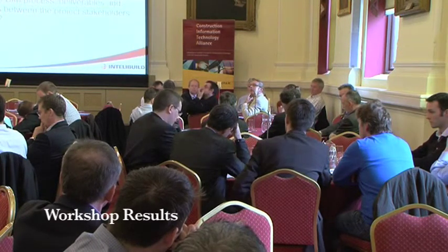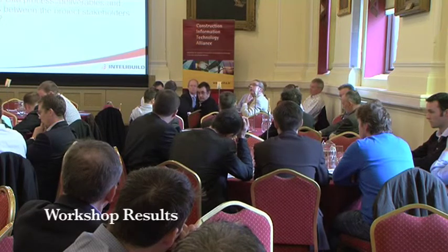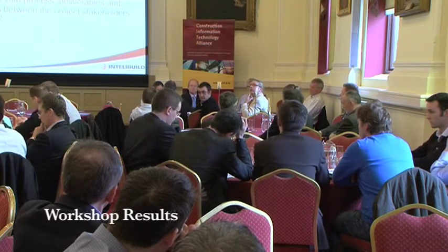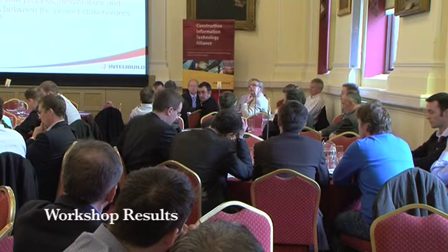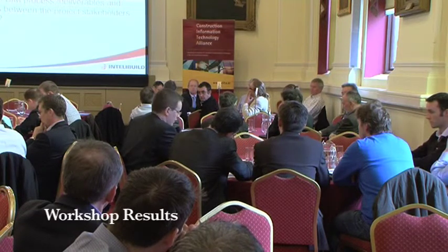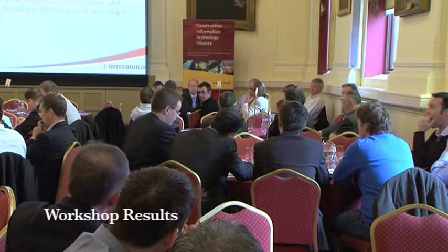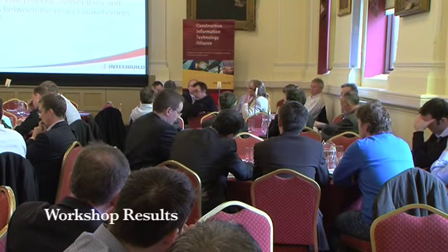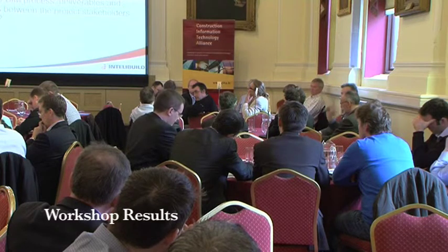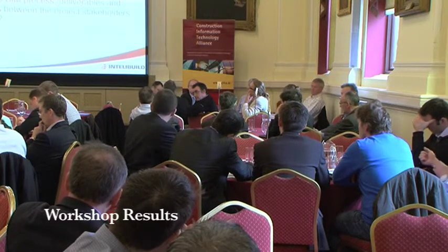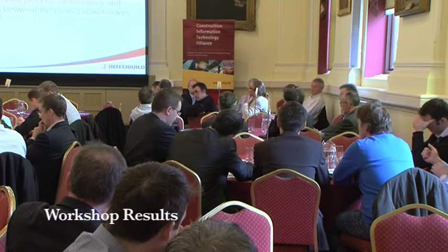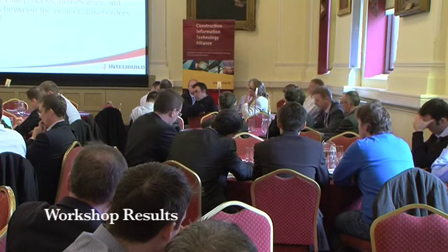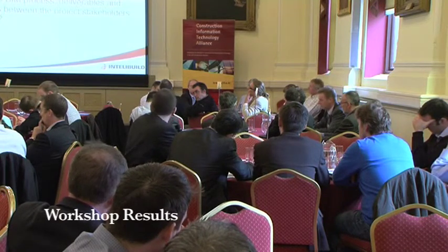Otherwise, they could get a BIM project manager in to create the BIM execution plan, and then he defines the BIM process, deliverables and interactions. So it really depends on if it's a private client that can; if it's a public client, maybe not. But by the deliverables, because that's what we're getting at the end of the day, that can drive the BIM process and the interactions between the consultants.